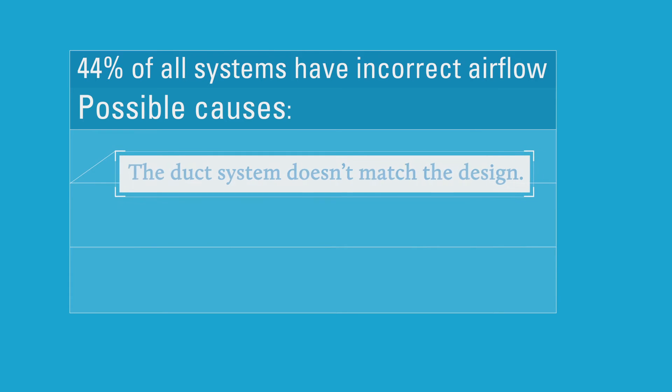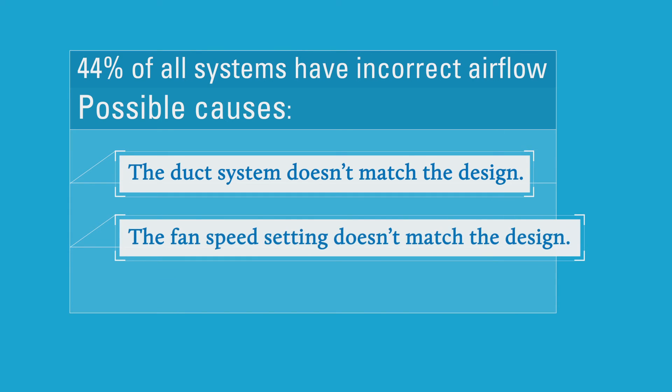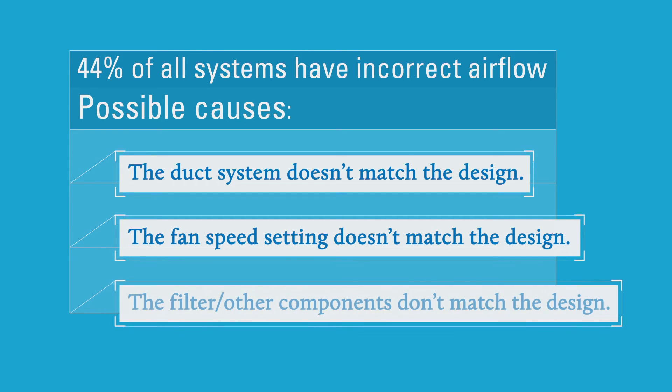So first, the duct system that was installed might not match the duct design. Second, the fan speed setting might be different than the design itself. Third, the filter, the evaporator coil, or other components of the HVAC system might not match the components that were selected at design. Now if all three of these things are correct, then there's a pretty good chance that the airflow will also be correct. If the airflow is off, then it probably means that one of these three things has gone wrong.